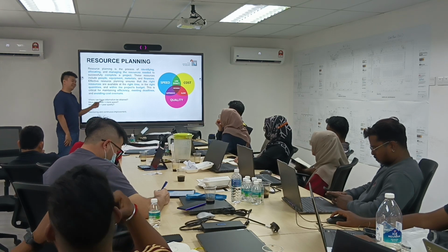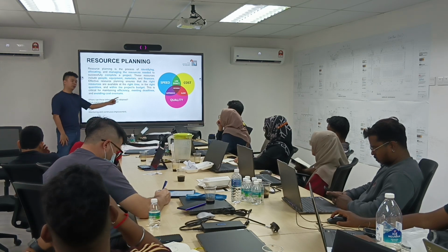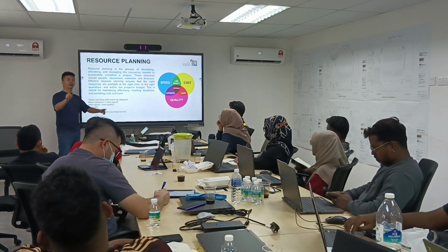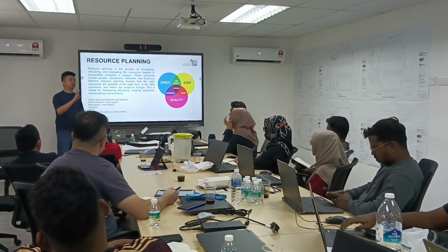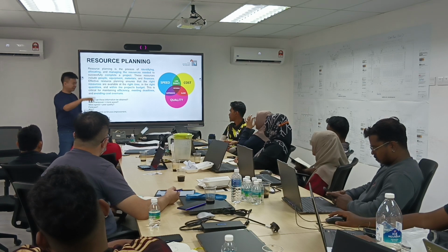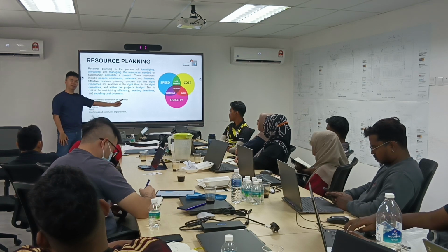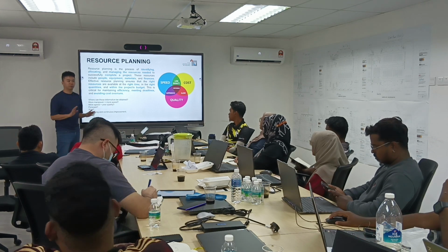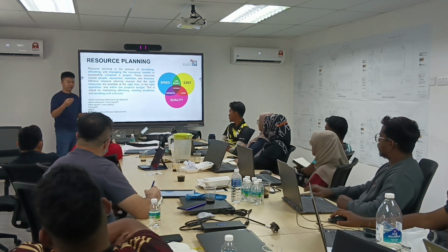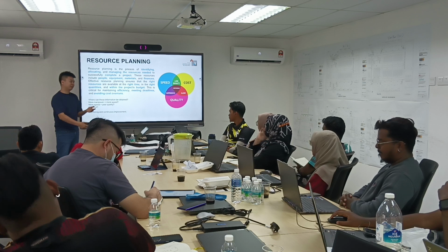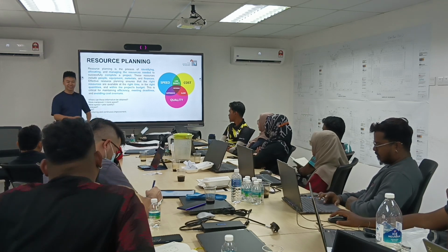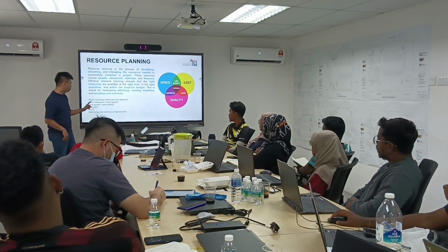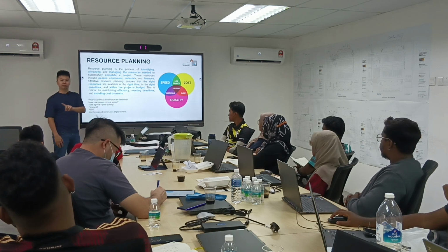So, like this, I say, more manpower equal to more speed? No. Let's say I want to renovate this room. I throw in 200 people into this room. Do you think that more manpower equal to more speed? No, right? That's why this equation is not equal. But a lot of people, if you base on scientific calculation, more manpower equal to more speed is true. But in a project management perspective, no. So don't always think that more manpower equal to more speed.